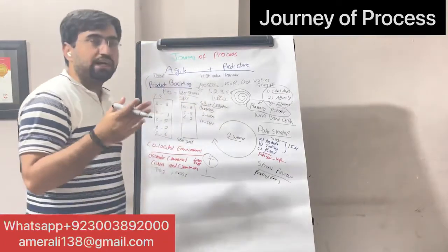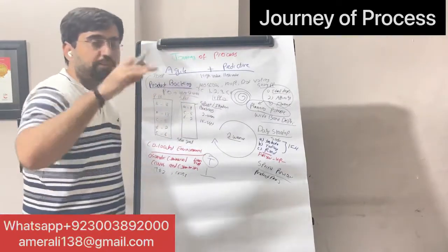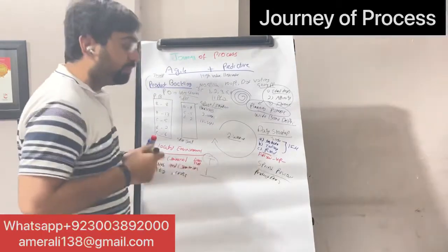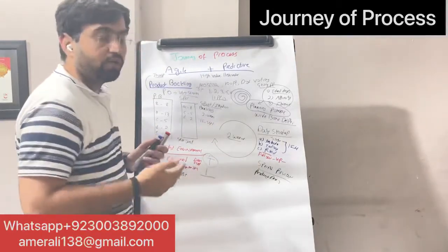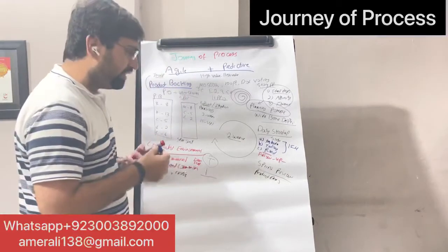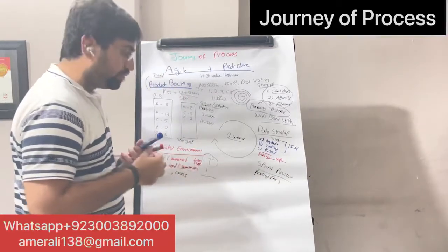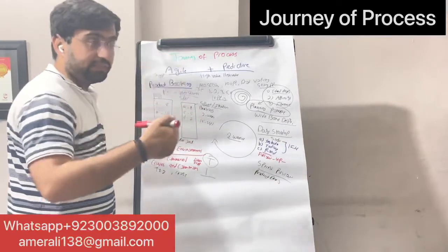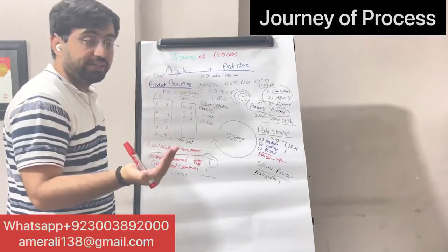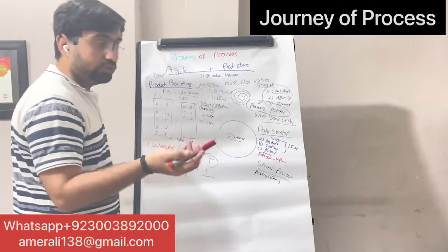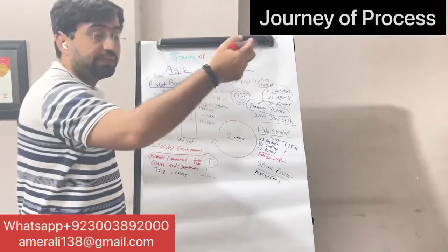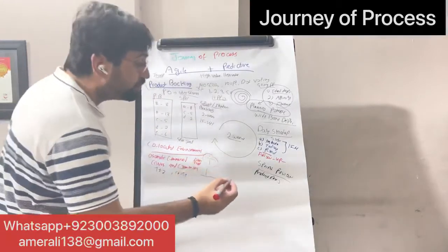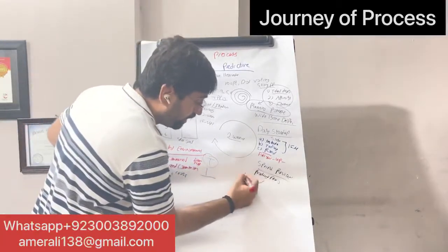If user stories are large, we call them epics. You break down the user stories so that you can complete them in a sprint. So in sprint review, the product owner, sponsor, everyone comes there. You show them what you have completed so far, what is in the product backlog. They check it against their acceptance criteria. If they accept your user story, it goes into the release plan, it goes into the future. If it gets rejected, it goes back into the product backlog.